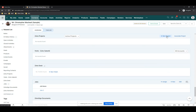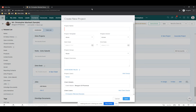Let's add a project. I'll go over here and say New Project. We give the project a name — let's say we're building solar panels on people's houses — so we'll call it 'Solar Panels at Home.' There can also be a template. In the case of our solar company, you'd have to do drawings, measurements, get the plan signed, order materials, install it, check with the power company, handle permitting and licensing. You might not want to start from a blank project every time — you can use a template so all those steps are predefined.